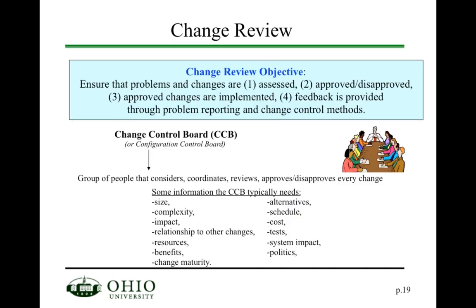Then eventually some board or group of people must approve these changes and update the baseline. If you look at change review, the objective is to ensure that problems and changes are assessed and approved, that approved changes are implemented, and feedback is provided through problem reporting and change control methods. The change control board is the organization within your group that manages this change review process.